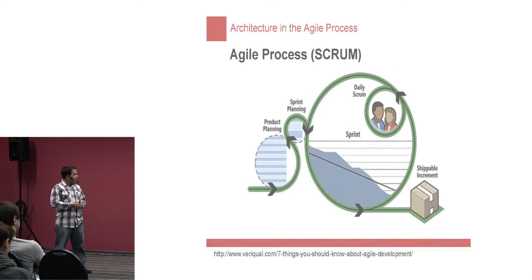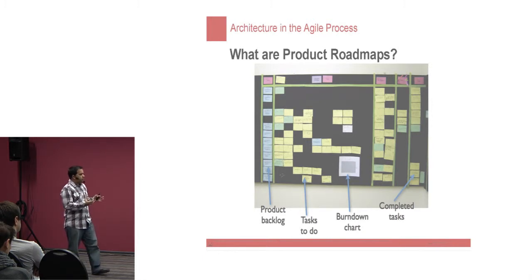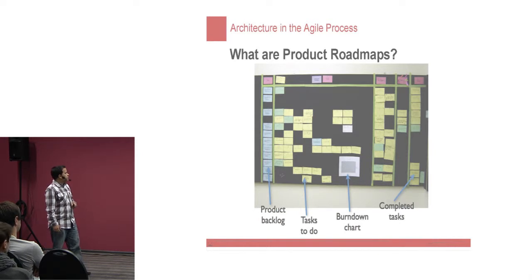What makes sense to me here is that we shouldn't only be doing this based on user stories, which is one of the premises of Scrum. We should also have our architecture stories as part of that. Right now we have product backlogs that describe new user functionality, so why not have an architecture backlog that defines all the stories that might or might not be related to supporting a product? That is the idea in general.